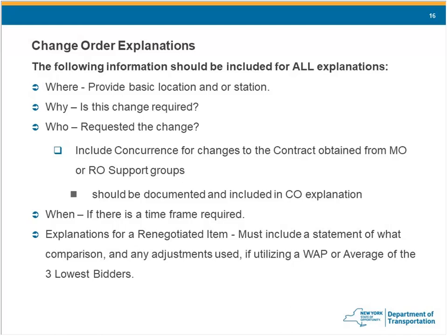But the key piece to remember for the audience here is you want to try not to have a $0 change order going all the way to OSC. So always incorporate as much other things into something like that as you can without it muddying the waters of what your issue is for that order. And that's all I have for questions so far.